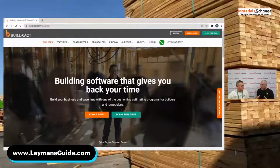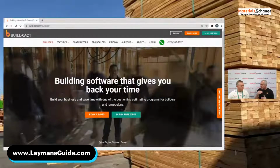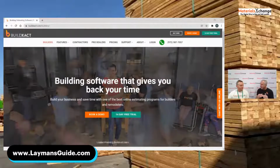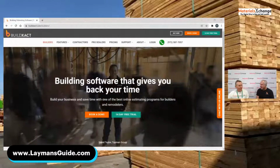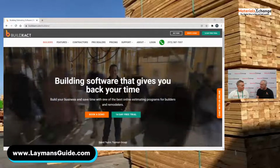I mean, it's pretty chaotic out there. And as a result, our research tells us the average builder is adding 20% to his costs above his margin, just as a risk factor, because of the poor quality of information he's got in his project when he's actually got to go out there and win the job. It's actually 20% over his close cost. There you go, right? And then because he's not managing his project, he eats that 20% as well as the rest of the margin. All right, so out of the gates, we're changing from this square foot model.